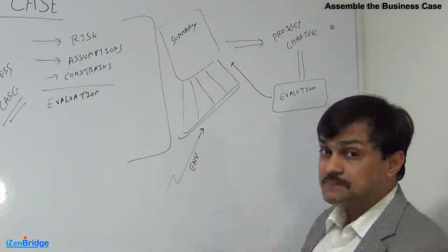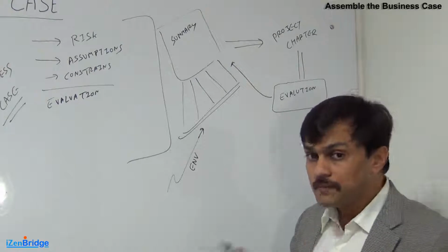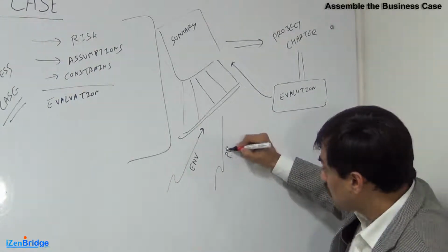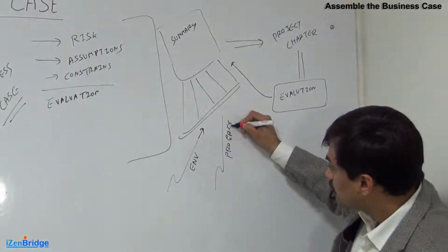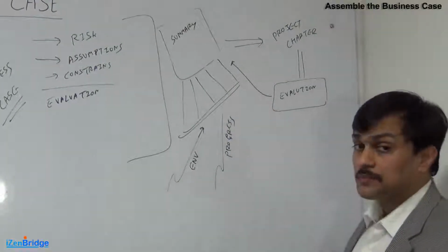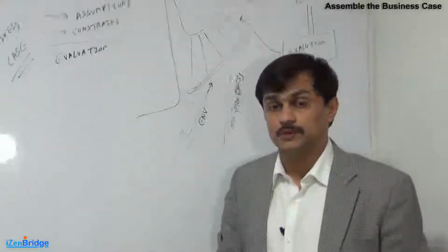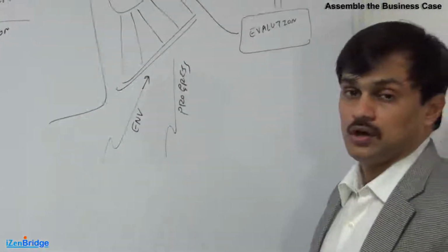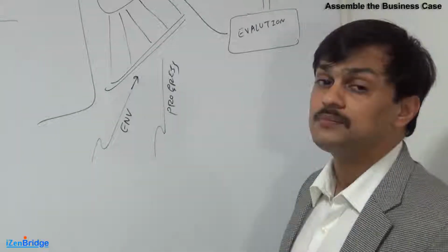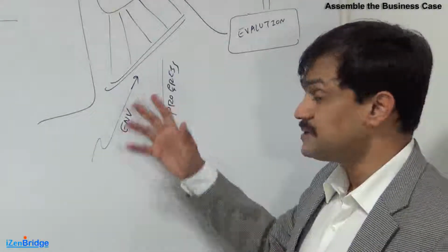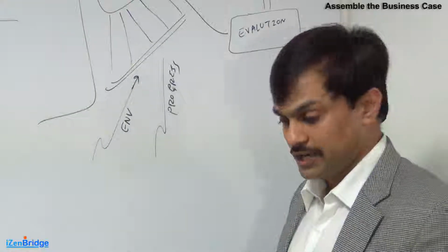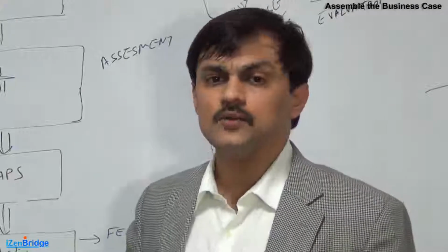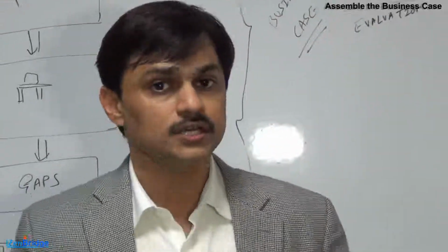So we need to keep taking feedback from the environment, and from the project progress as well, in the business case. Because if the project which we thought we would be able to do in 1 month is taking 1 year, it may not be feasible, may not be making business sense, because the business case may not remain valid. So in general, at a summary level, it's a very important document.